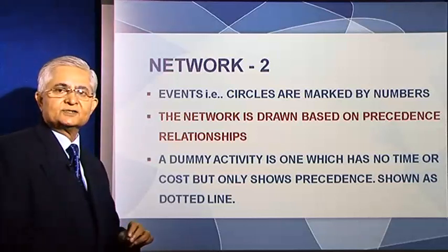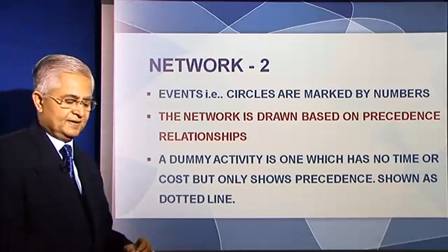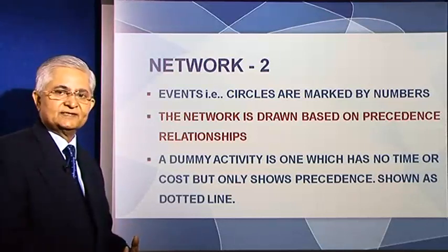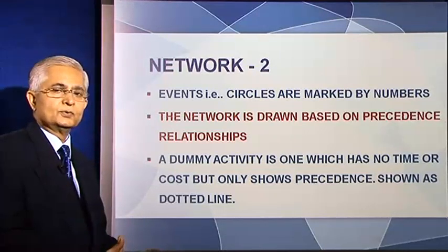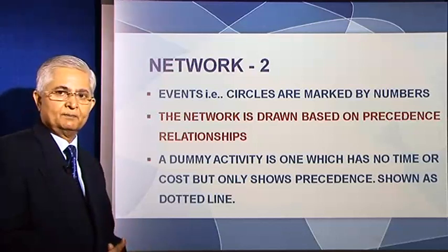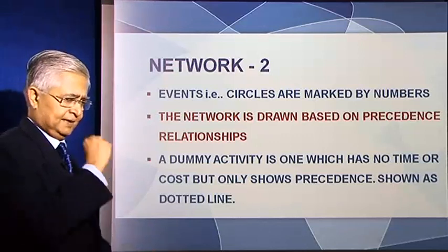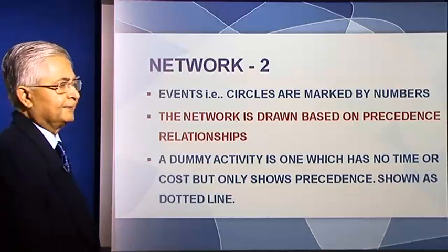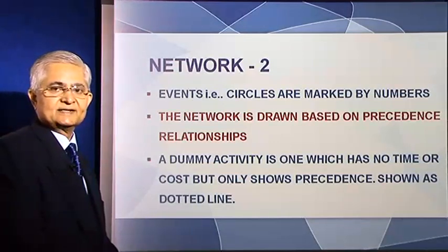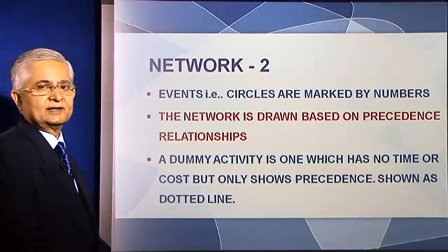We may come across situations where there is an activity which has no time and no cost, but shows precedence. Such an activity is called a dummy activity, and it's marked by a dotted line.